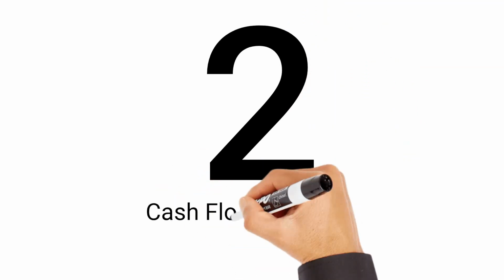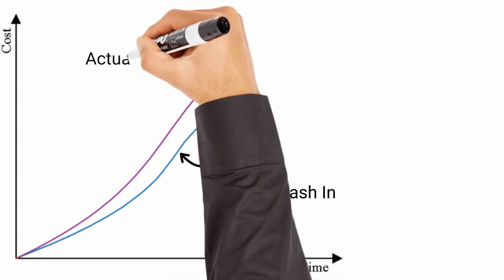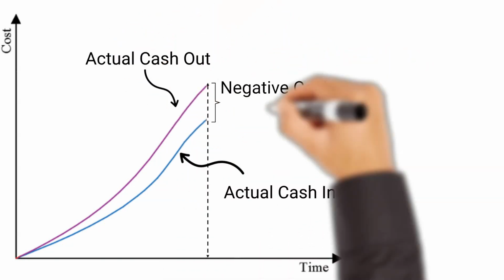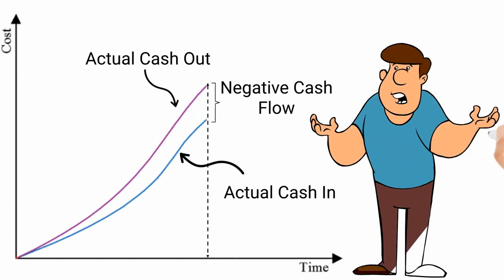The next use of the S-curve is for cash flow forecasts. Cash flow is the movement and timing of cash with respect to the events in a project. Drawing a cash flow curve has several benefits for the stakeholders. One of the primary benefits is to evaluate the need for cash and the timing of payment obligations.